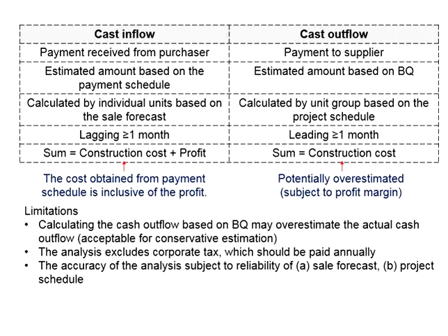Now the question will be, how confident are you that you have taken into account all the necessary expenses associated with that particular work? There may be some hidden costs that you might overlook, which, if you totally remove the profit margins, you might underestimate the amount of cash outflow, which subsequently may lead to underestimation of the potential risks of your project.